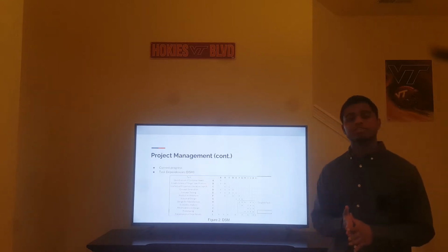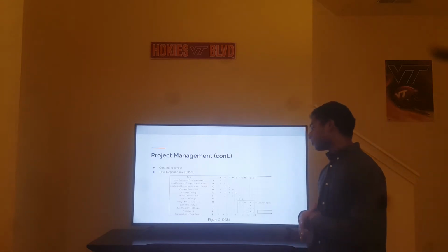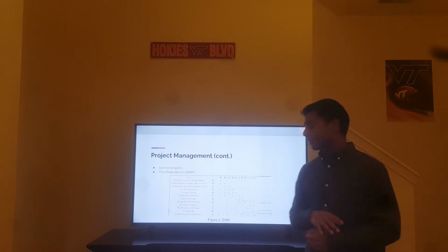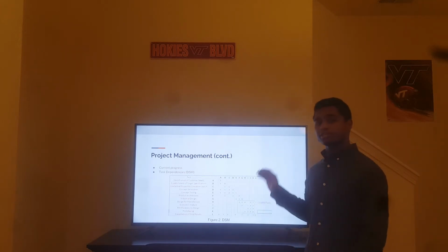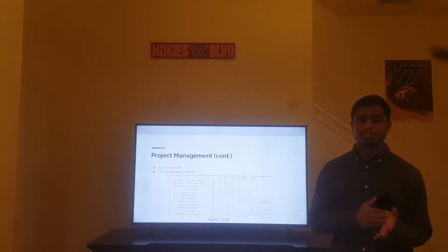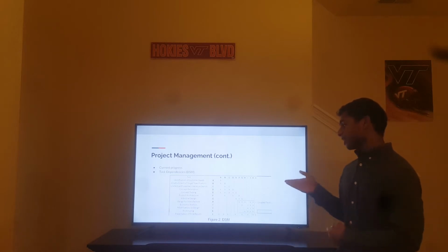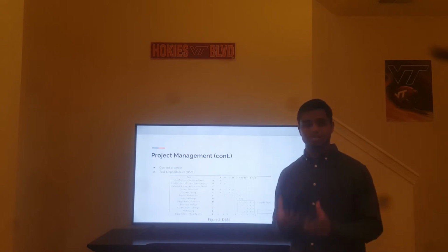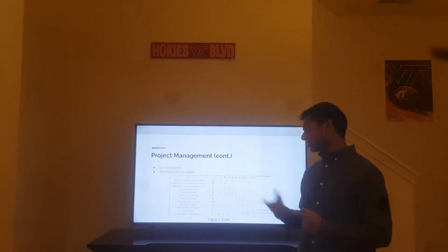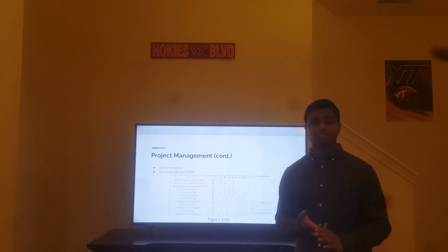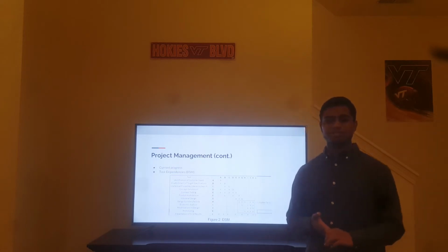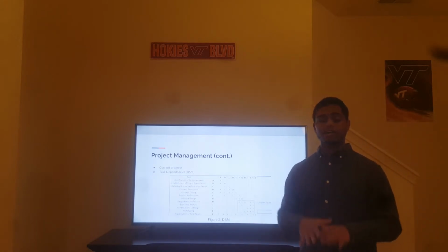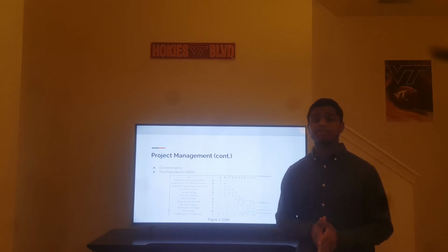This is our DSM matrix showing the dependency of each of our tasks and what we believe will be necessary to be completed beforehand and other tasks in general. As I stated earlier, tasks A through E have already been completed and we are now in product architecture step F. But tasks H through K will be coupled tasks, meaning they need to be completed simultaneously. This means that the design for manufacture, economic analysis, modifications to design, and prototyping must all be completed simultaneously so that they are accurate, specifically so that the economic analysis can be an accurate comparison and analysis of our design.